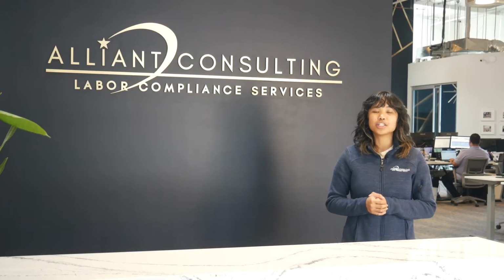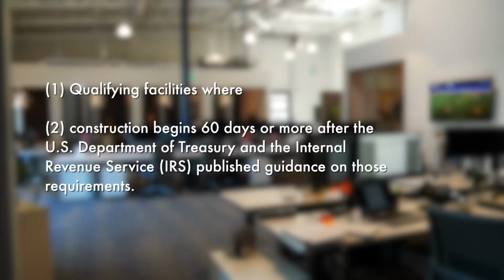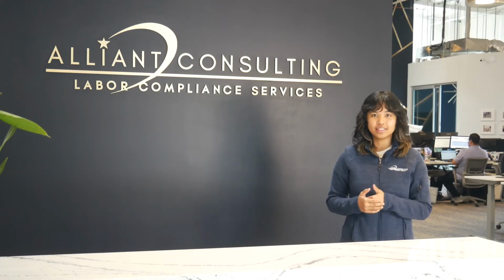Before identifying which wage determination you'll need for your project, it's important to note if you have additional tax credits or incentives that are applicable to your project. The prevailing wage and apprenticeship requirements generally apply to 1. Qualifying facilities, where 2. Construction begins 60 days or more after the U.S. Department of Treasury and the Internal Revenue Service publish guidance on those requirements. Here's a list of some examples of qualifying facilities.